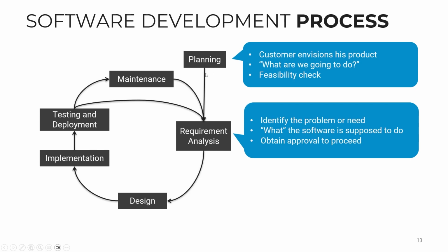In the planning phase, this is the part where you study the idea. You don't have to spend too much time, too much money, too much investment on this. You just think about the idea. You roughly estimate how much we need to do this and how long we need, and then if it's not feasible, we discard the idea and look for some new things to do.